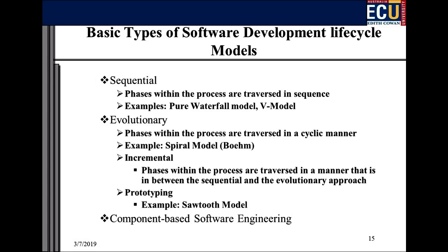You create a design, you make sure, okay, yeah, it traces back, and that's your design. So you code exactly what's in the design, you deliver it, and everybody's happy, you get paid. Right? That's what the sequential processes are. Now the stereotypical one is the waterfall model, which exactly does those steps. But in reality, that's not the case.